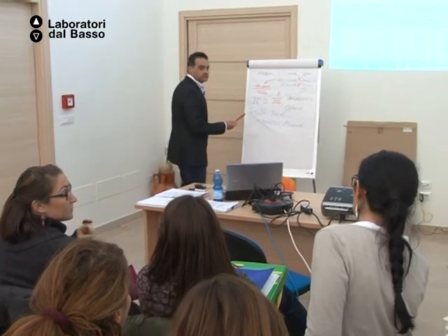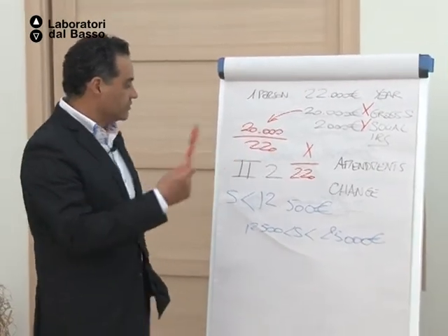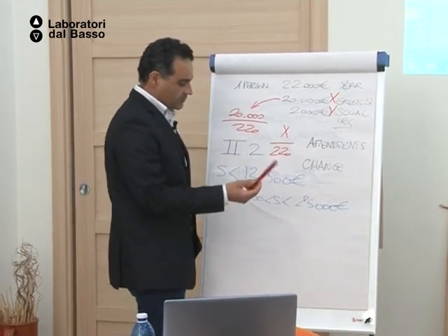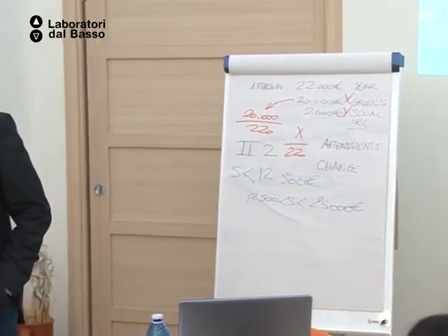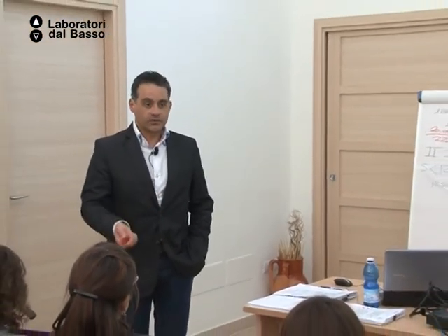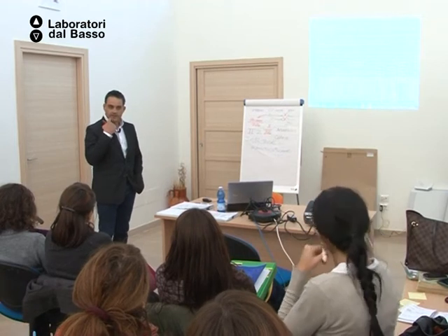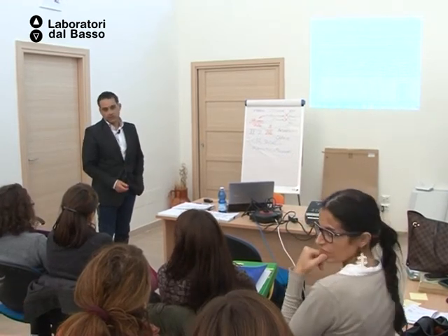Before you apply, you want to subcontract this. You subcontract 20,000, yes. Then before filling the application, you have chosen who you are going to subcontract. You keep it with you. You put the amount, you put the name, and you have it with you. And then the project is approved and you start working with the project. At some point, they might ask you, look, this company ABC, show me the tenders and show me the contract of procurement.